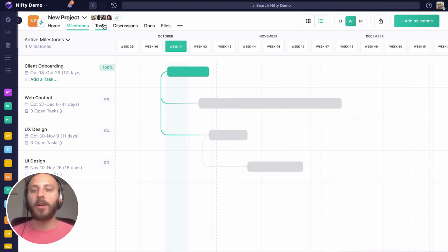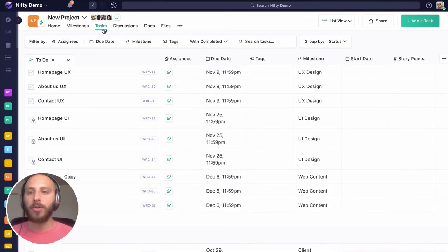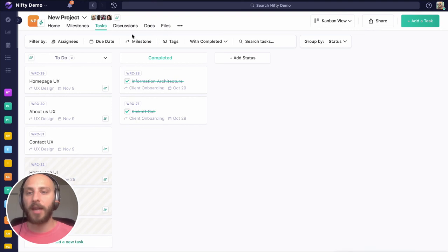It's also worth noting that all the tasks that I create are going to appear in the top list on our list view, the top status, or in the furthest left status in our Kanban board. And you can actually go ahead and tie tasks to milestones from here. You can even do so in bulk. So if you started by dropping a bunch of tasks down first, you did not do it the wrong way.